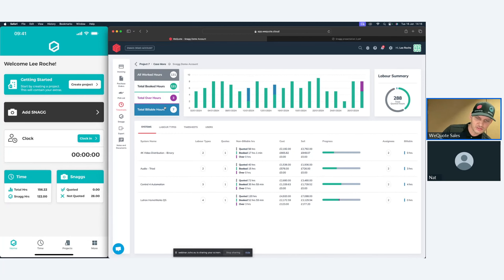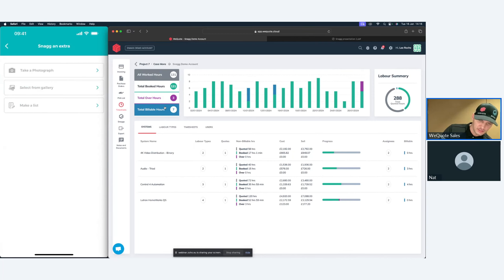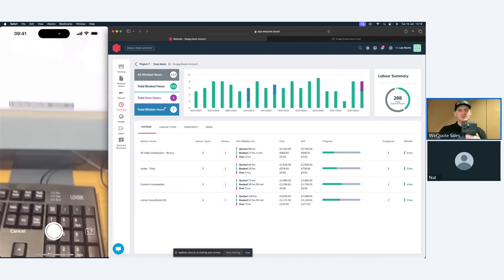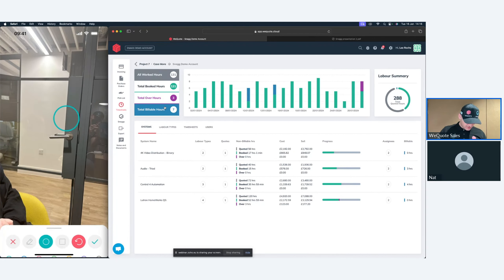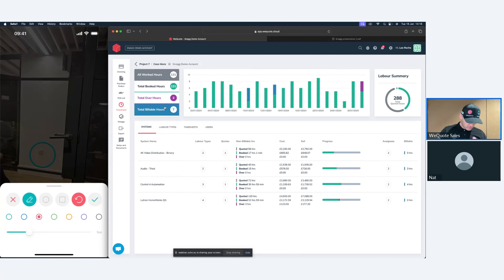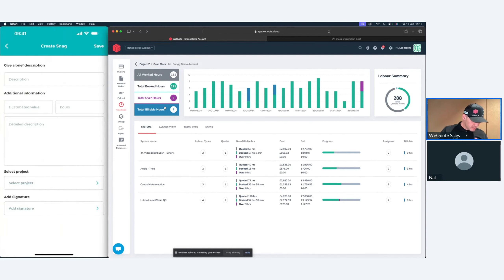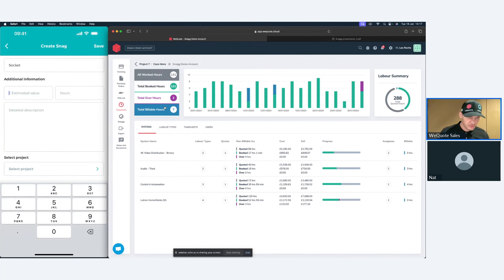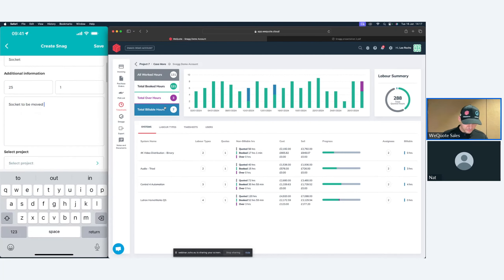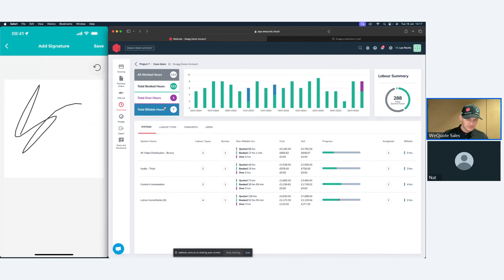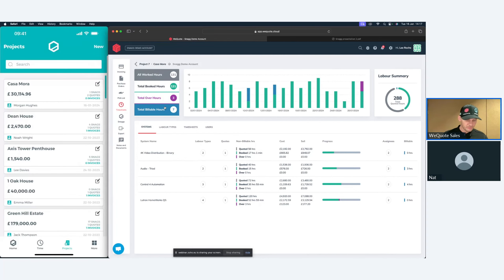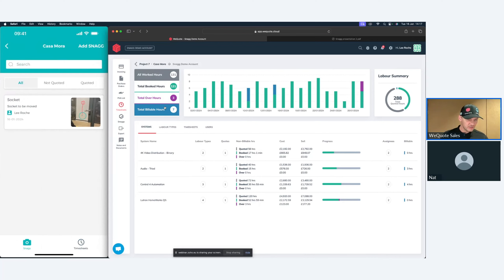You can create a project with basic information — select the currency, add a customer or new customer, and assign it to the project. For adding snags, you take a photograph — let's say that socket is in the wrong place and needs moving up. You can save it, put time to it, put hours to it, leave the cost blank if you want, select the job, and optionally sign it off by the engineer or the customer. Save that, and now in my project I can see this issue.